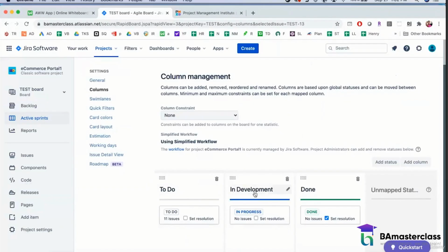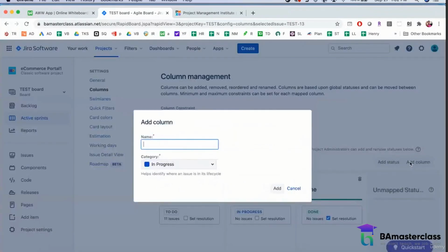Once the development is done, how would a QA know that the developer has completed this and I can start testing? What could I create? A lane. I want to create another lane saying, Ready for testing. Great, love that. You could say ready for testing, or you could say development complete. You could have either of them. But this is good. I can say ready for testing.